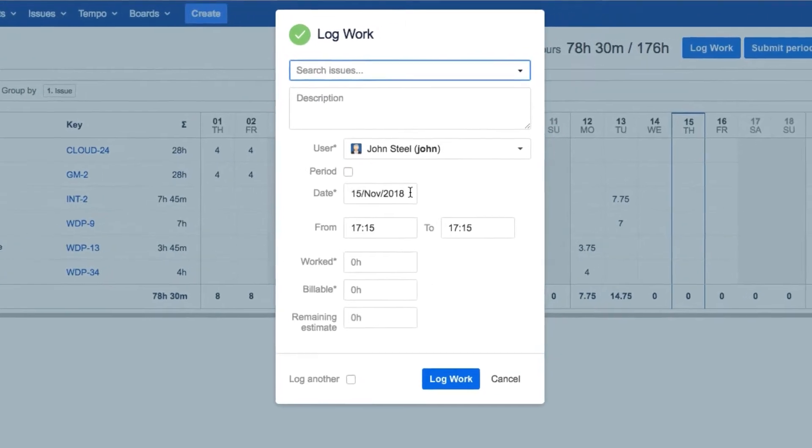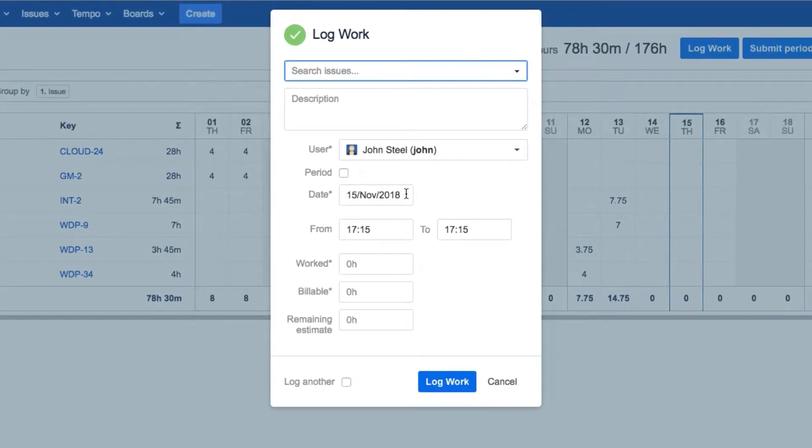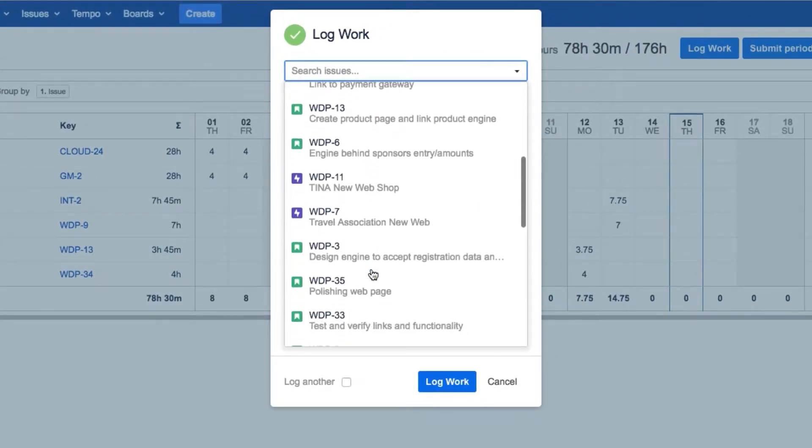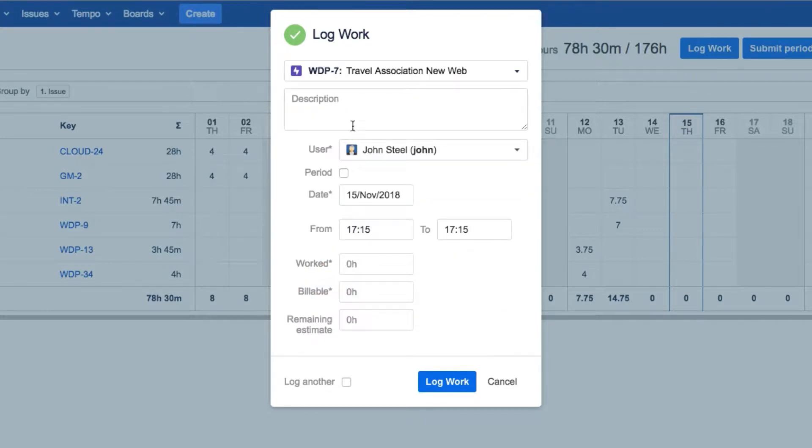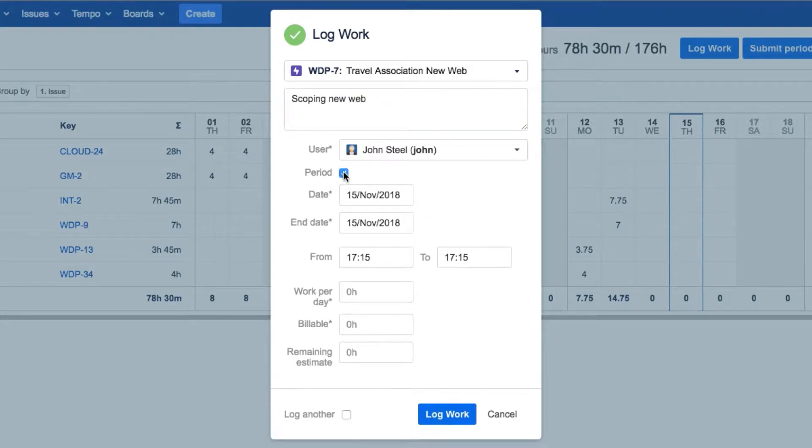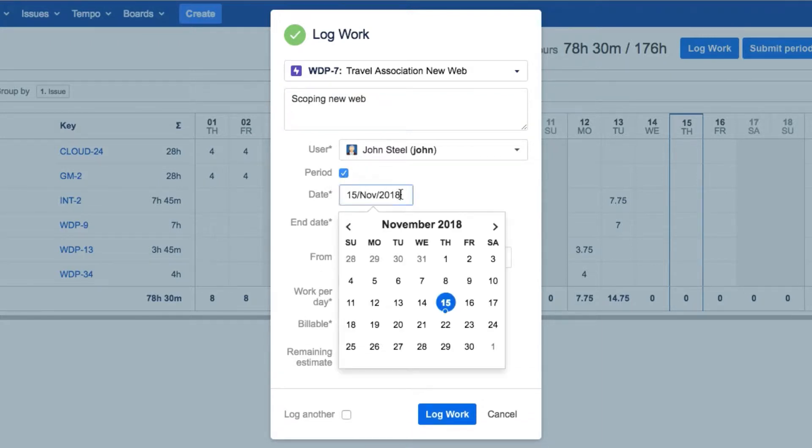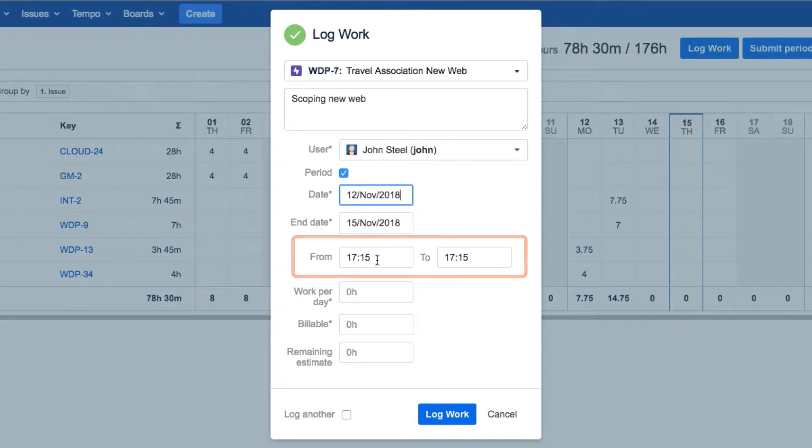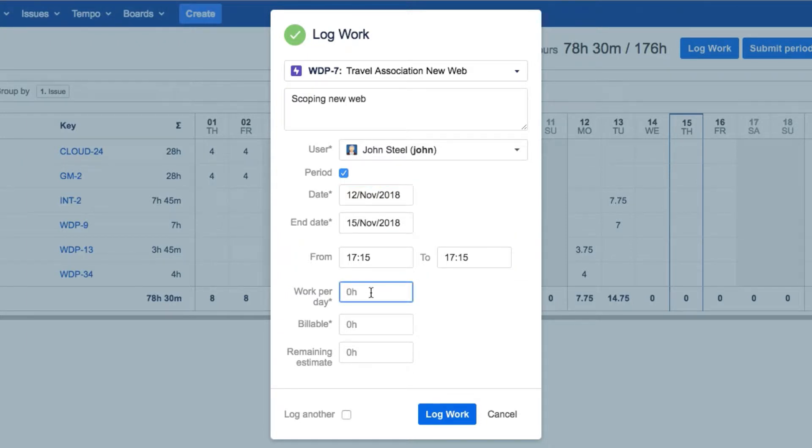Let's look at how to fill out the Log Work dialog. First, you need to select a JIRA issue to which you'll log your work, and add a description of what you worked on for that issue. Select the day or period of time for which you want to log work. If you need to specify which hours of the day you worked on this issue, you can do that here. Or just add the number of hours that you worked on this issue, if it doesn't matter when.